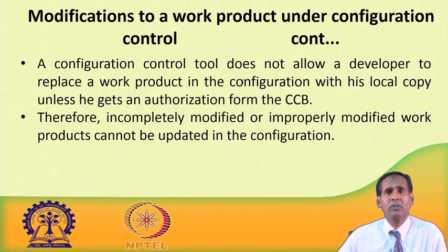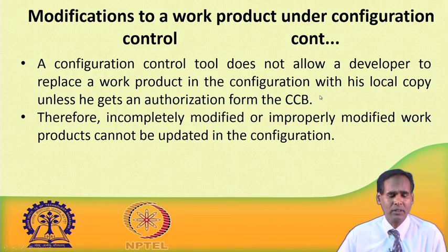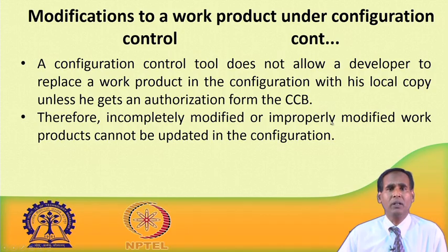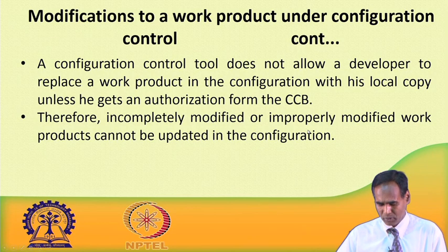That is why the configuration control tool does not allow any developer to replace a work product in the configuration with his local copy unless he gets permission from the CCB. Therefore, incompletely, improperly or inaccurately modified work products cannot be updated in the configuration.